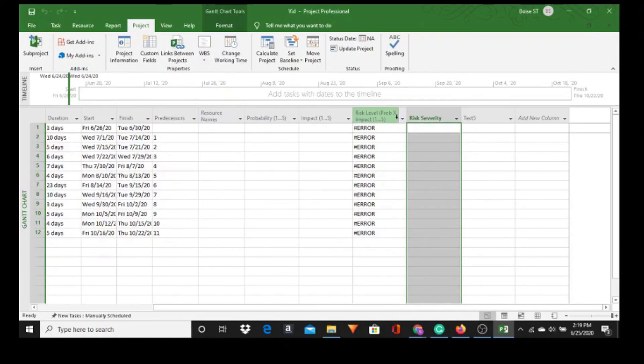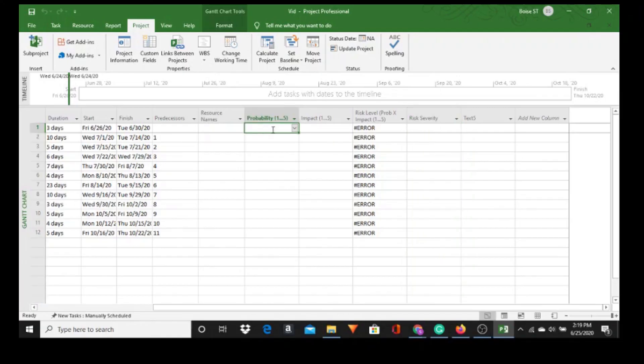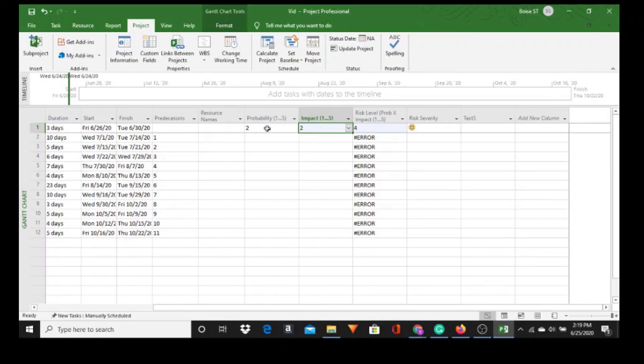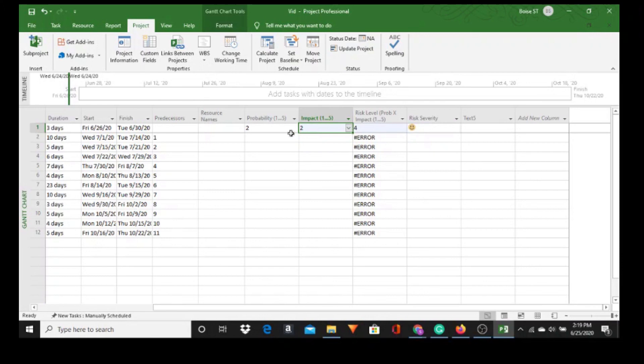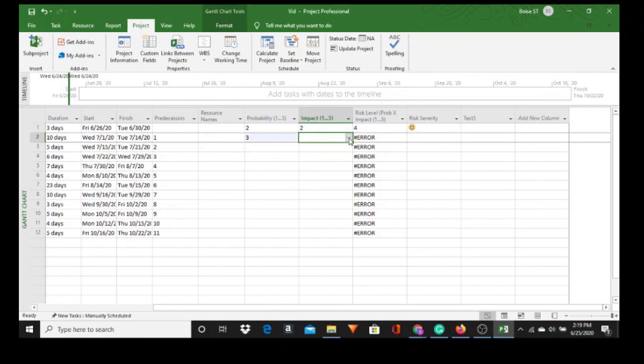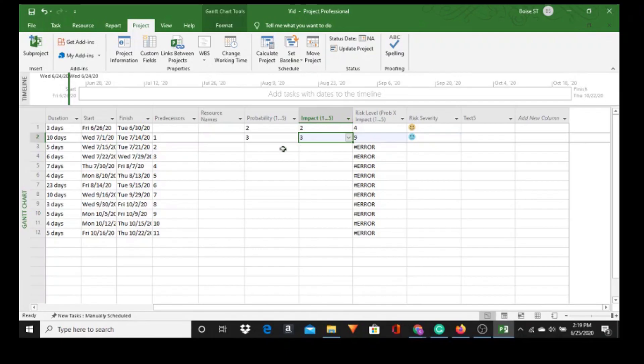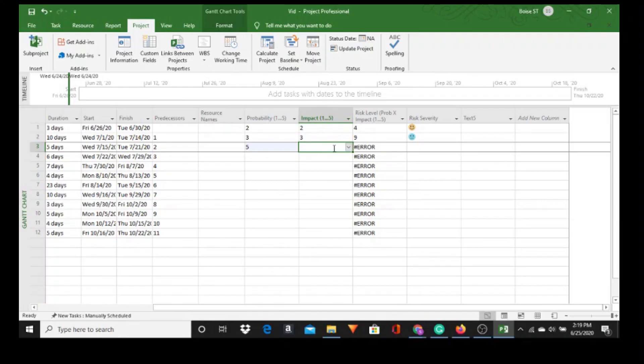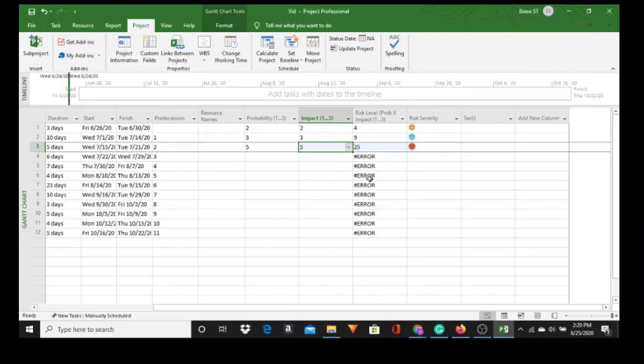So let's start putting some values in Probability. Let's go Medium Low and we'll go Medium Low, and it populates with a 4, because it multiplies - because of our formula - it multiplies Probability times Impact, and we get a Low. So let's go Medium times a Medium, a 9, which is a neutral, neutral face. And let's do a High, and we get a red face. How to do a risk assessment in Microsoft Project. Thank you.